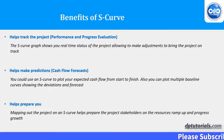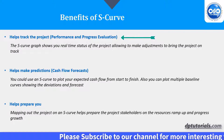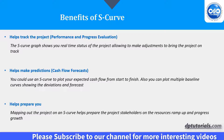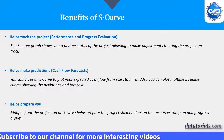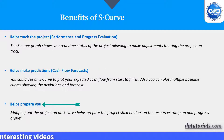Benefits of S-curve: It effectively helps track the project and we can make corrections to the plan by re-baselining. It helps in forecasting cash flows and in preparing all stakeholders by regularly informing them on the progress, resource ramp-ups, and corrections.